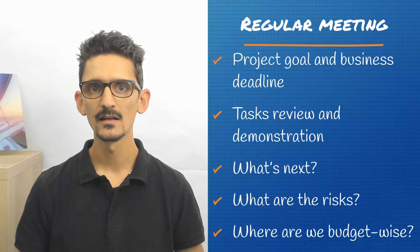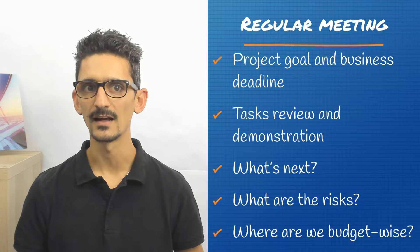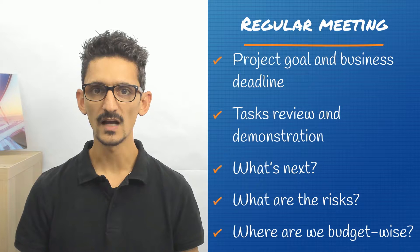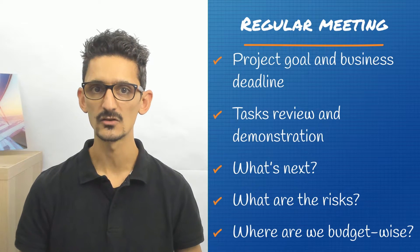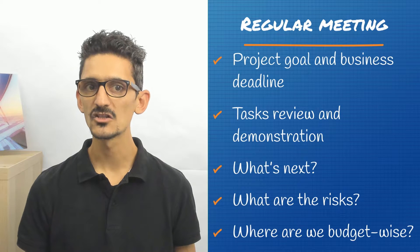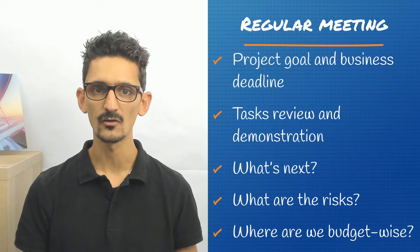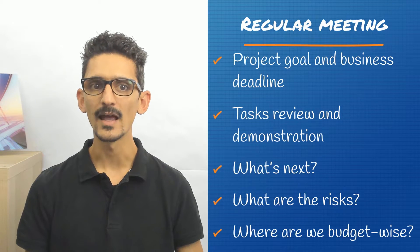During this meeting, go through this agenda. First, remember the project goals and deadline. Ask for demos of what has been developed so far. Discuss which features are to be developed next and let your provider ask questions and reformulate the feature ideas. Next, check if there is anything going wrong and if any difficulties have come up. And verify if you are still on track, time and budget-wise.